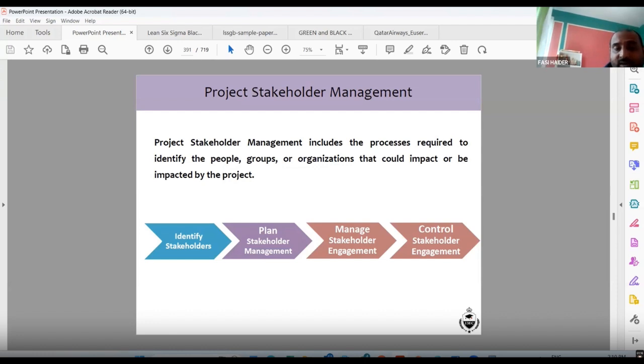So you have to identify the stakeholder. Sometimes some people are informed, but you want to take further action. For example, there is a project that we have done and the customer is not paying. As a project manager, if I have already spoken to them many times and they're not paying or something is pending, maybe I will escalate it to the next senior management, that is my boss. Why am I escalating it? So that top management of my company can negotiate and discuss with that company so that it can be taken care of. So sometimes an informed person needs to become responsible. You have to understand who is what type of stakeholder.